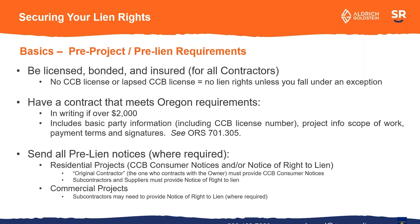To be able to file and enforce a lien, you need to be licensed, bonded, and insured with the Oregon CCB. If you don't have a license or if it lapses, you can lose your lien rights, so it's important to keep those things in place throughout the duration of the project. You also need to have a contract that meets Oregon's requirements — those are available on the Oregon CCB website. The contract, if it's for work more than $2,000, needs to be in writing. It needs to include basic party information and your CCB license number actually on the contract itself or any attachments. You want to keep your basic project info on the scope of work, the payment terms, and the signatures showing that both parties agree to the contract.